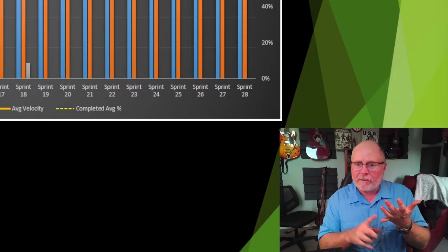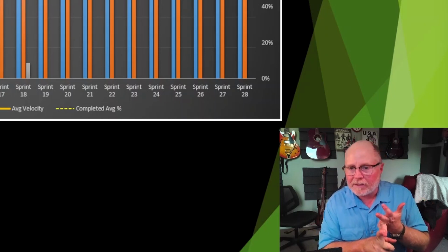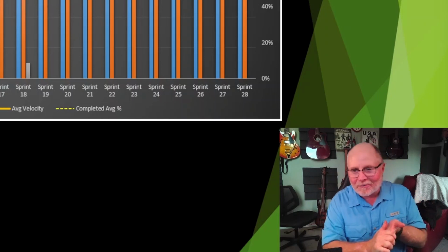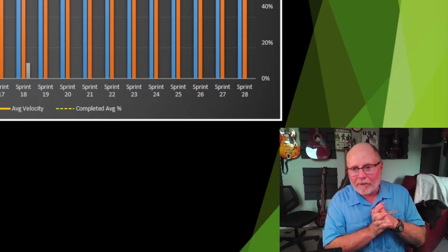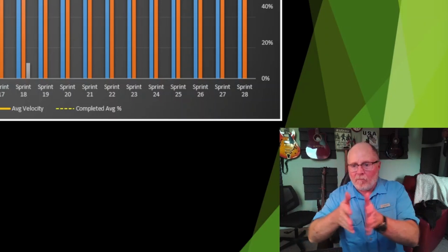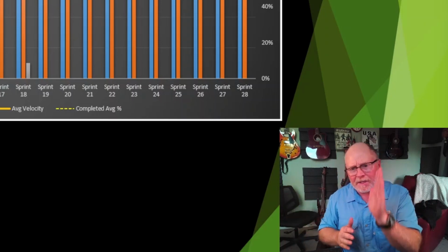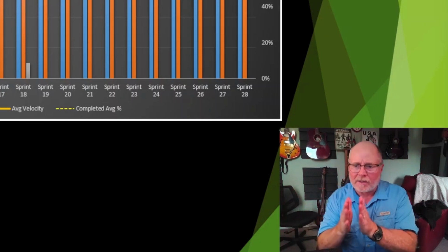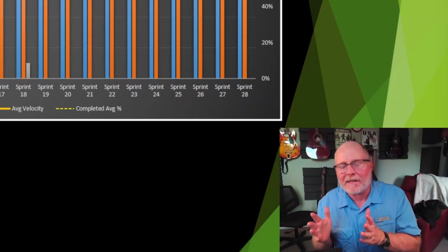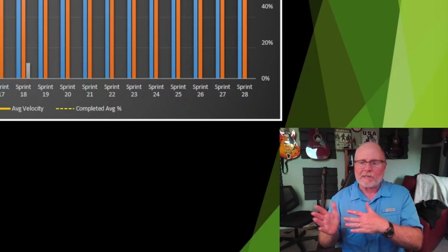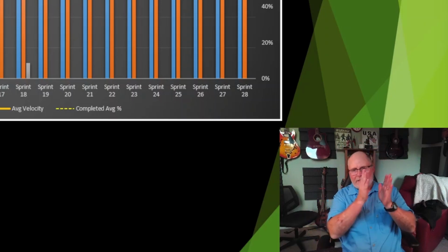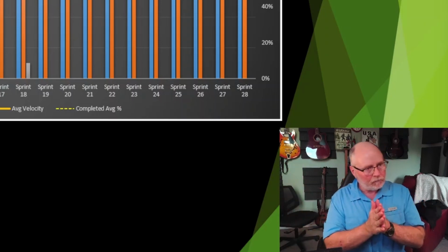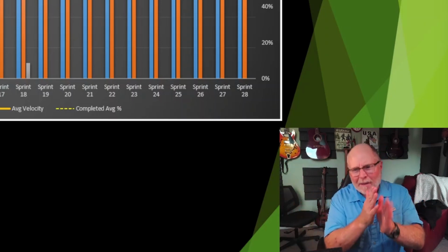We applied some WIP limits, clarified the exit criteria, clarified definition of done, clarified definition of ready, worked on the working agreement, redid their board so that we had more vertical columns because I wanted to see where the wait lanes were. I saw at one point there was over 40 stories stuck in test. And I said, well, what the heck's going on here? You're not testing all of those. What is in test and what's actually waiting? So we created some, waiting for test, waiting for approval, waiting to deploy, that kind of stuff. And then we began to identify, all right, what's happening in test?